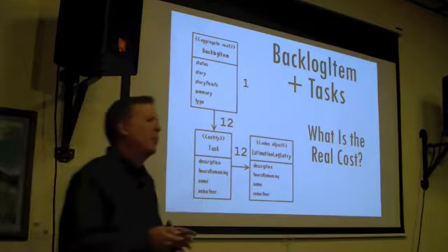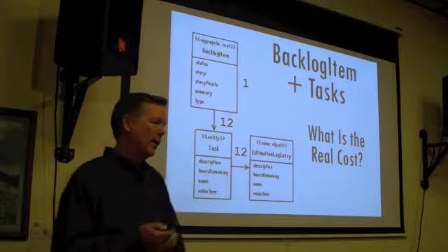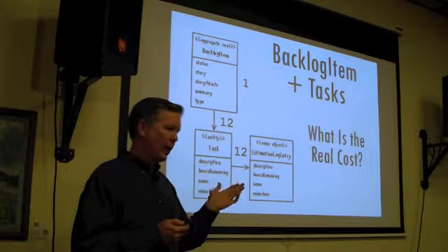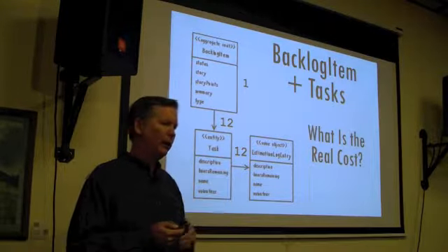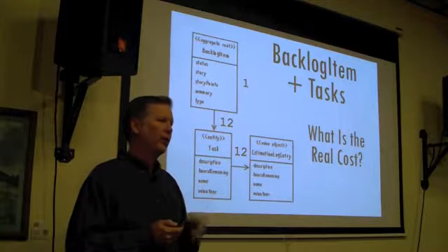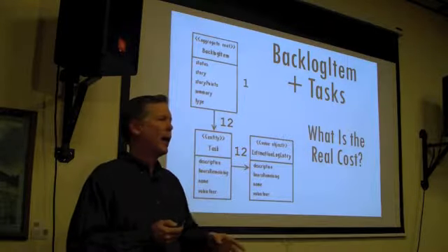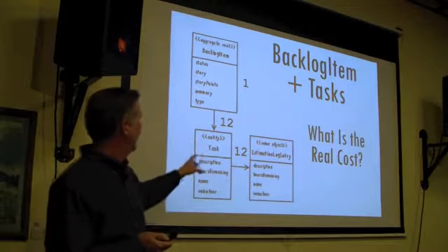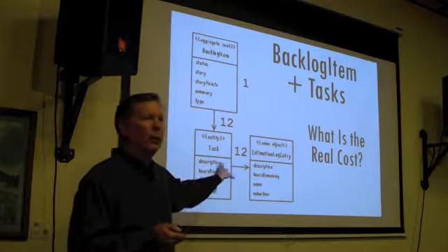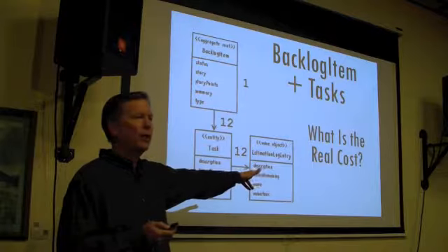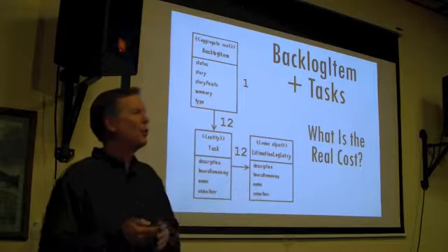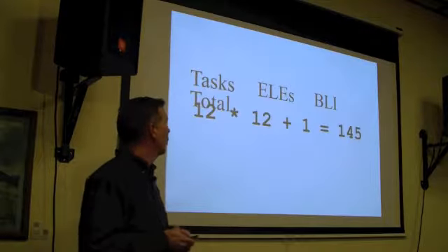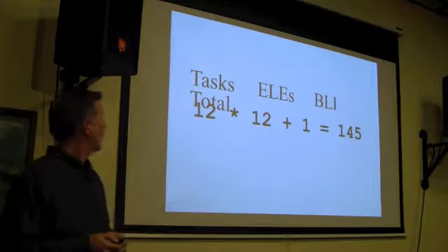It could change a little bit. We could say, well, Scrum experts say that when the number of hours on any given task exceeds 6 or 8 or something like that, break that up, make it a smaller task. Well, that would tend to make more tasks, but then fewer estimation log entries. So, it's just a trade-off. What do we actually want to test for? But this gives us something to work with. So is this really...